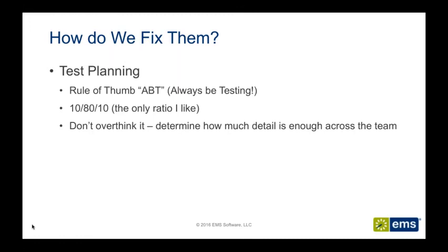Multiply that by 10, and there's about 60 hours of work in a sprint. Whether you do capacity planning formally or not, or estimate in hours or point your work, you still have a set amount of hours within a sprint, and I like to be accurate with that.